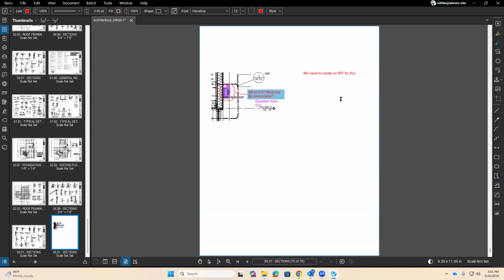So from, to, sent on, need reply by, meaning I'm asking you a question, I need a reply by whatever date. By the way, if you don't reply to that, guess what? If I'm delayed because of you, now it's on you. It's your problem. Right? So that's why we want to create RFIs.